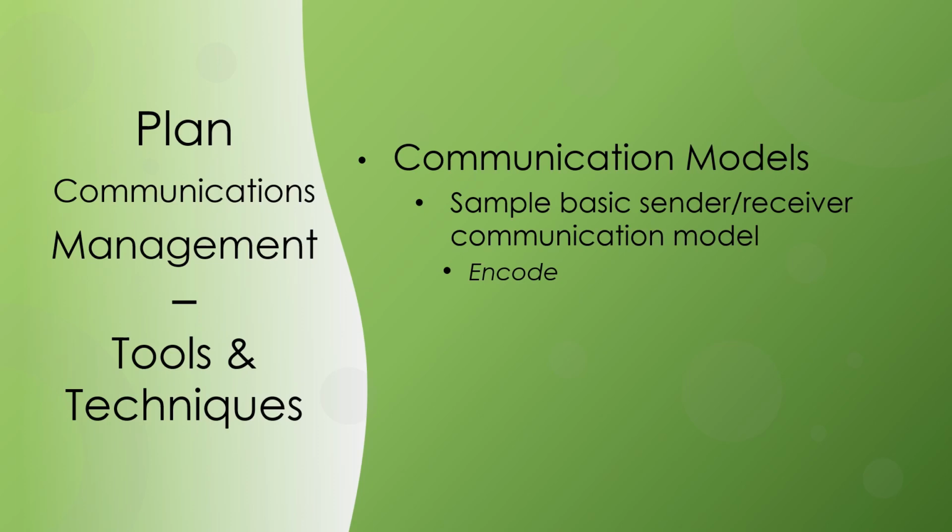symbols such as text, sound, or some other medium for transmission or sending. Transmit message. The message is sent via a communication channel. The transmission of this message may be compromised by various physical factors such as unfamiliar technology or inadequate infrastructure. Noise and other factors may be present and contribute to loss of information in transmission and/or reception of the message. Decode. The data received is translated by the receiver back into a form useful to the receiver.